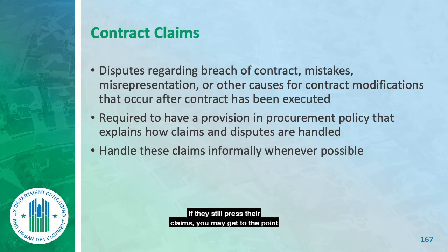If they still press their claims, you may get to the point where you need to send a certified return receipt letter, where you say, this is how we're addressing this, we're done. Just remember, you're in charge of your contracts, not them. Contractors are not in charge of us. We're in charge of our contract and our work. So you decide how you're going to do those things. My one point about disputes and claims is, don't ignore them. Conclude them. You might ignore individual points and not respond to them, but overall you're going to respond to the claim for the points that you want to make to them. This is what it's going to be.